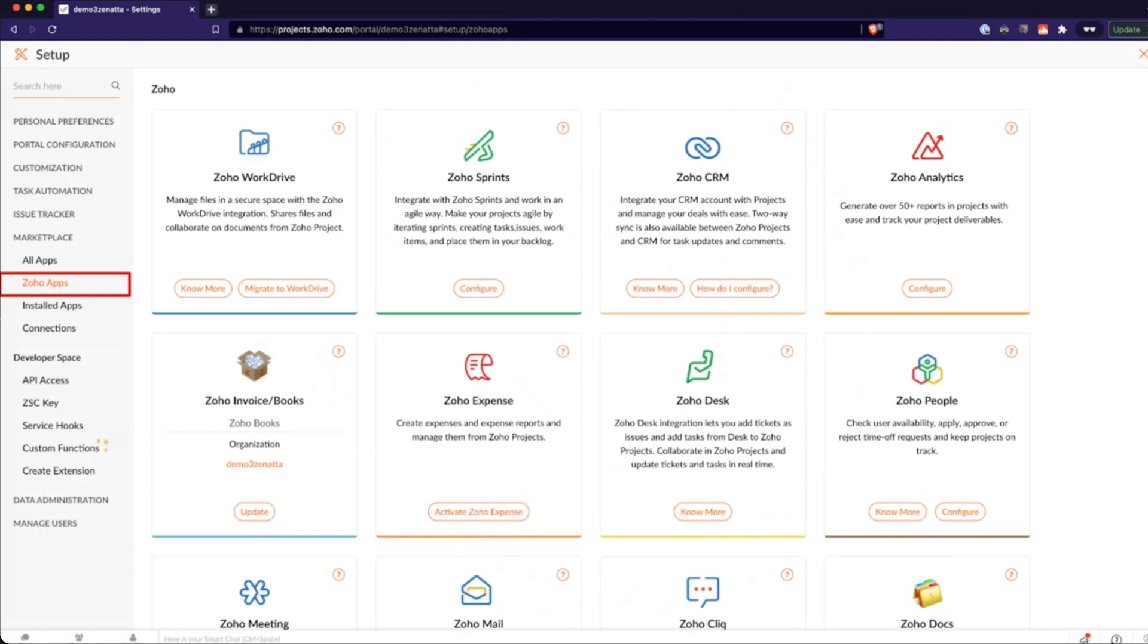People is kind of interesting, but one thing that's nice about it is that if someone has a time off request inside of Zoho People, it'll show that if you try to assign them a task on that date. So there's some availability integrations there, as well as some of the time roll up that you're able to report on within Zoho People.